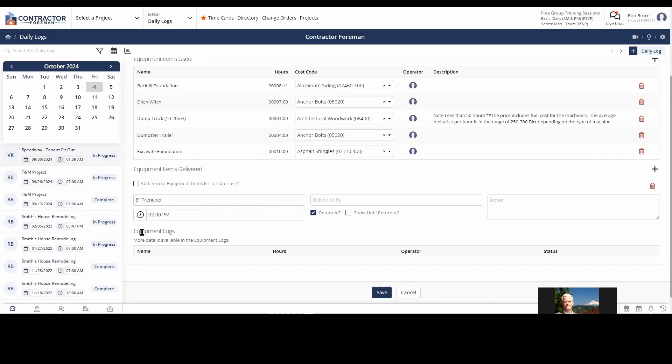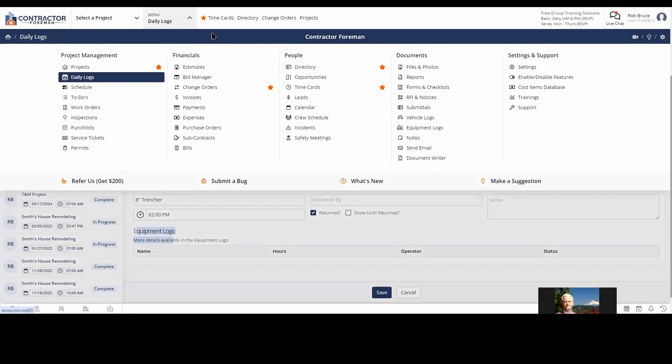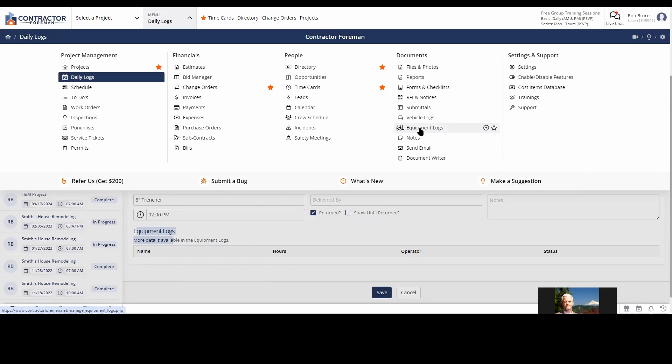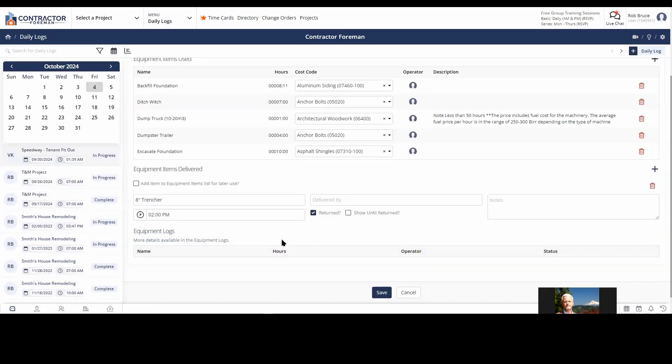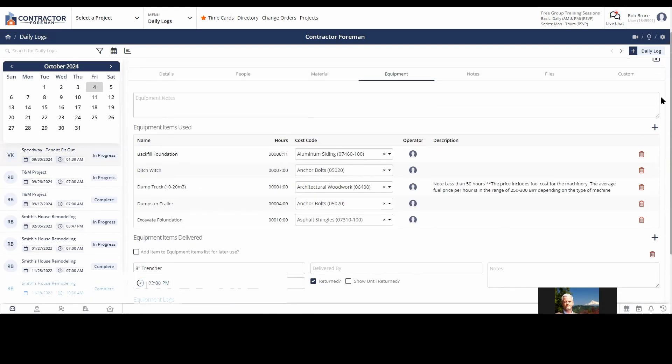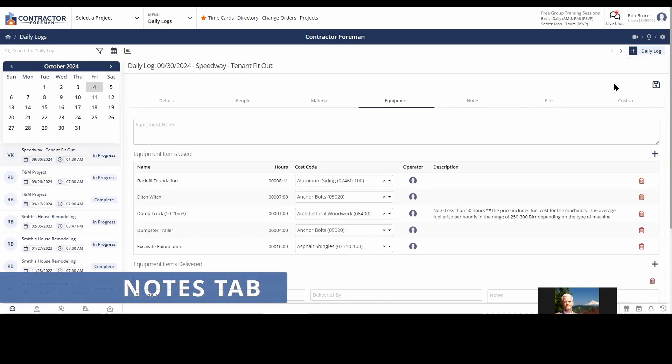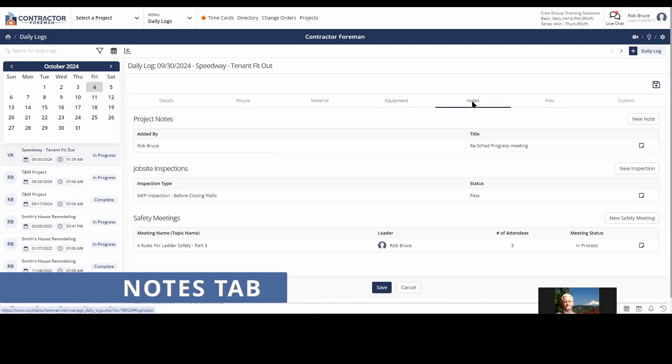Equipment logs. As somebody fills out an equipment log, which we do have equipment logs over here. So if somebody's using the piece of equipment, they should be responsible for filling out the daily log. And then that will automatically feed back down into our daily log.